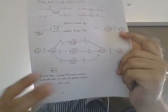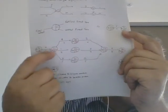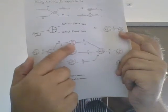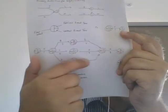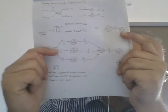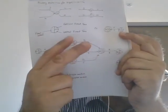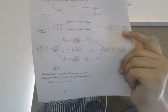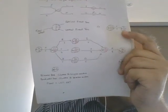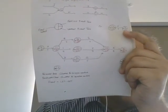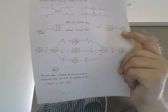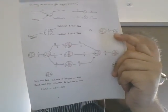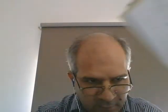Therefore, the critical path is now no longer one, because you may find that the top path becomes 24, or the bottom path becomes 24 as well. But nonetheless, the center path remains as 24 also. So in that way, you have now no longer a single critical path. Rather, you have two critical paths with you. So we're going to learn how we can do this a bit more automatedly using certain software. So I'll end this video, and I'll show you how that software works. And now we can get pretty much the same results using that. So thank you so much.